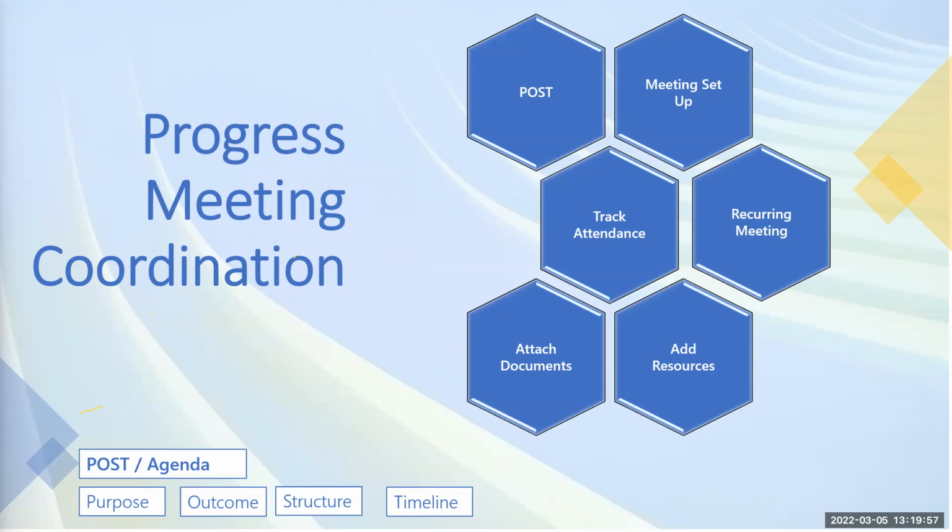So have an SLA. SLA is service level agreement, saying at the end of every meeting, it could be the change one or the risk one, we will communicate the outcome of the meeting to everyone that is in attendance or those that are not in attendance in the next one day. So it's more like sending out the actions or minutes. Well, it depends on the organization. Some people do minutes, but I don't do minutes. So you'd send out the actions.